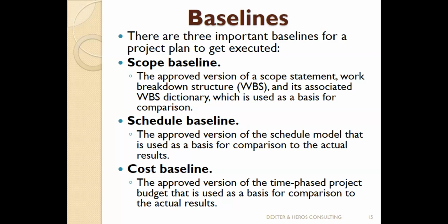If the sponsor is too busy to approve or sign every part of the plan, no problem. Three parts are most important for the sponsor to sign so that the project can start. What are they? He must sign that part of the plan where you listed the works to be done. When he signs it to say the scope has been baselined, that is the scope baseline. It must baseline the scope.